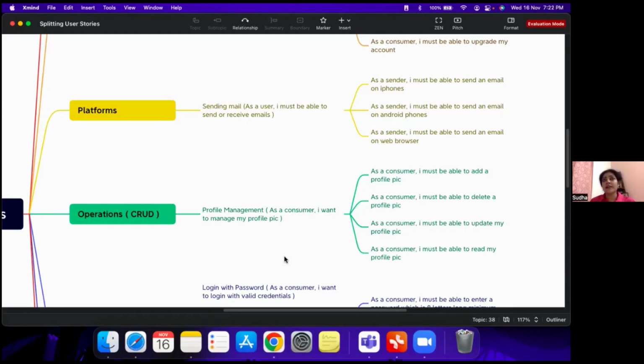What is the acceptance criteria for each of these individuals, right? For a particular admin guy, he should be able to change the password. He should be able to delete or update an account. Okay, not just the consumer, but then he's got all rights. Then again, you would want to play around with the acceptance criteria of that particular story, which was built based on a persona, and further split it along the lines of acceptance criteria.